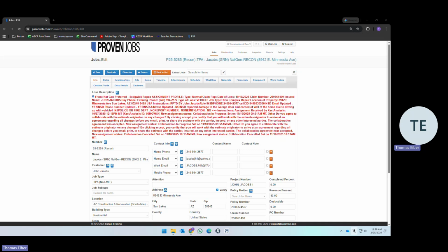You are also handling change orders and delays. So that's obviously a key transition point. If there's some kind of delay or a change order, it's going to change the estimated start or completion date, and that needs to be communicated to operations.